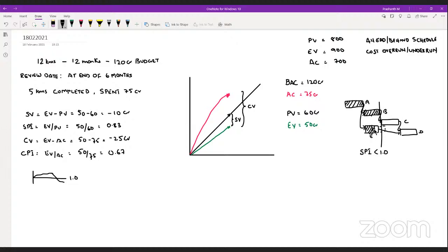So technically speaking, what does it mean? Actually there is no impact on the project schedule if you see the holistic view, because of the float there won't be any issue. By seeing the SPI value, we think that the schedule is slipping, so we are behind schedule. But actually, we are not behind schedule. Do you understand what I'm trying to say? Because there is a float, and within the float it got delayed, it's not that my project is getting delayed right now.